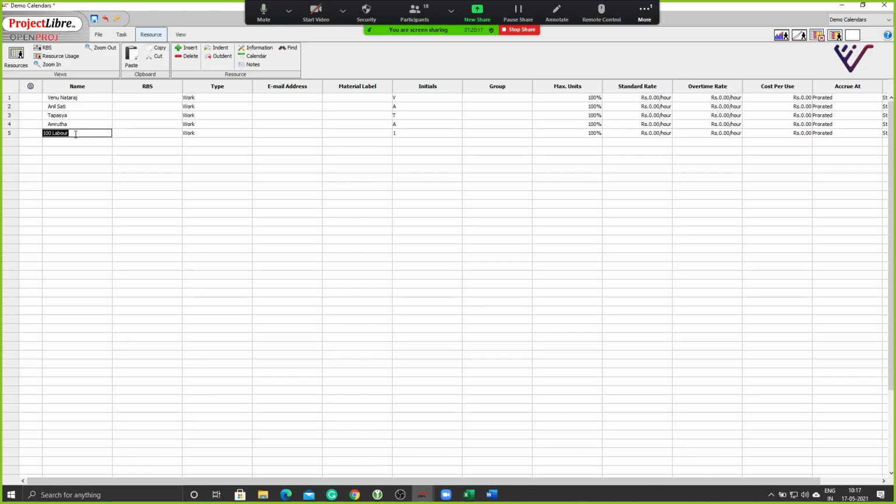So for all the laborers there is that particular calendar. Yeah, I can put all these laborers on one calendar type. They'll be working 6 days a week, 10 hours a day. But the designer or the site supervisor might be working 8 hours a day and 5 days a week.